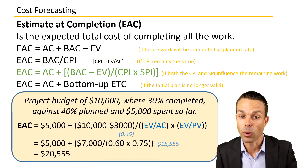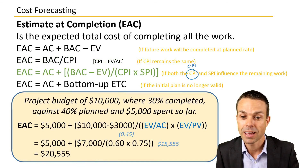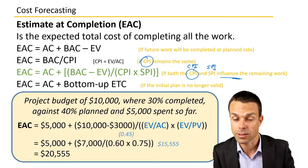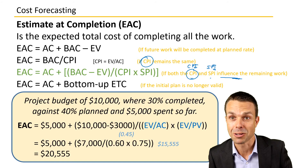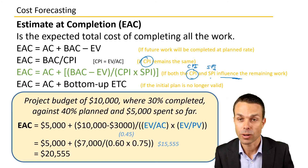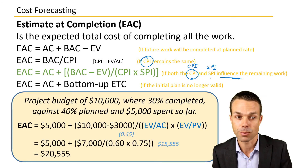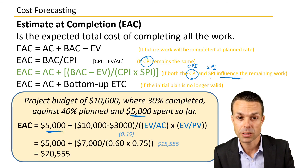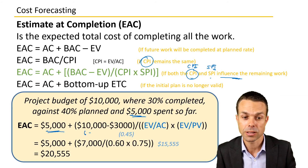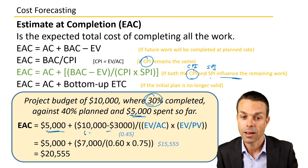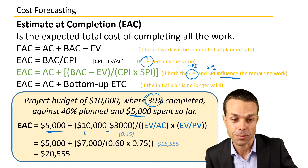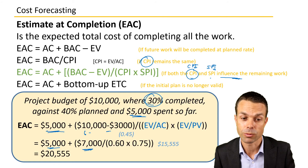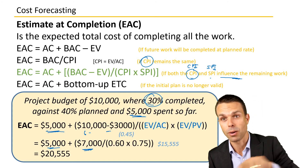The third formula is used when both the CPI (cost performance index) and the SPI (schedule performance index) influence the remaining work. The formula is: AC + (BAC − EV) / (CPI × SPI). We have actual cost of $5,000, BAC of $10,000, and earned value of $3,000 (30% of $10,000), giving us $5,000 plus $7,000 in the numerator — but that $7,000 is divided by CPI multiplied by SPI.